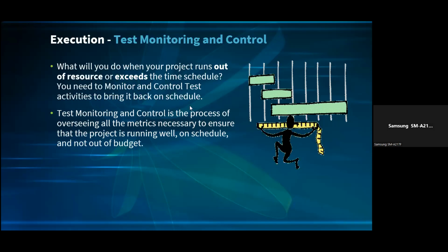We have said the test plan is going to take 2 weeks. So we know it's going to take 2 weeks, including sign off. Test cases is going to take the next 3-4 weeks. We know this is it. So all those things put everything in check, so that we know that we are on schedule, and we can deliver within the deadline.